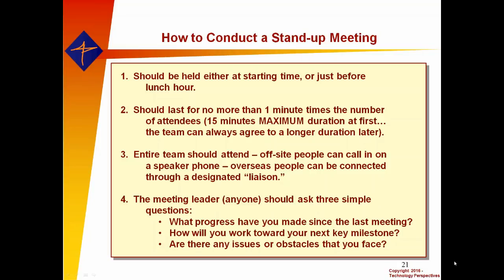So we move through the room, and the last person to speak is typically the team leader, to catch anything that was missed and maybe give any big picture direction that's necessary. The formal part of the meeting is over. You'll see in a minute we're going to update our project board. As we go through these answers, we'll be updating the project board.